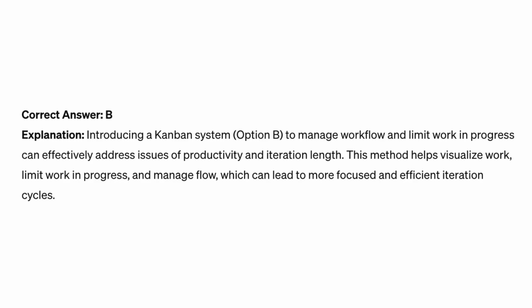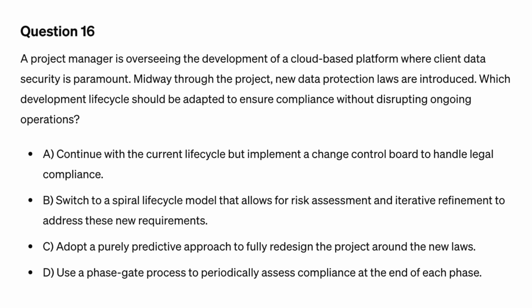Correct answer B. Explanation: introducing a Kanban system, option B, to manage workflow and limit work in progress can effectively address issues of productivity and iteration length. This method helps visualize work, limit work in progress, and manage flow, which can lead to more focused and efficient iteration cycles. Question 16. A project manager is overseeing the development of a cloud-based platform where client data security is